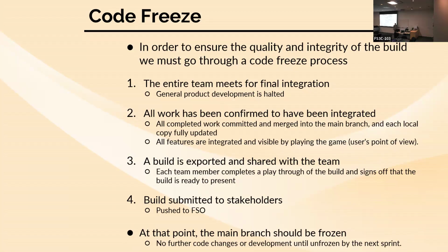This process shouldn't be a crazy amount of time. Really, what depends on how long this is going to take is how much the team has already been doing step 2, right? If the team has been doing step 2 all the way through the sprint, that's not going to take any time at all. If the team didn't integrate into the main branch at all during the sprint, that's going to take a long time, right? So just be aware of that. However long it's going to take is really dependent on the team's actual methodologies inside of the repository and whether things have been integrated consistently and been tested consistently.